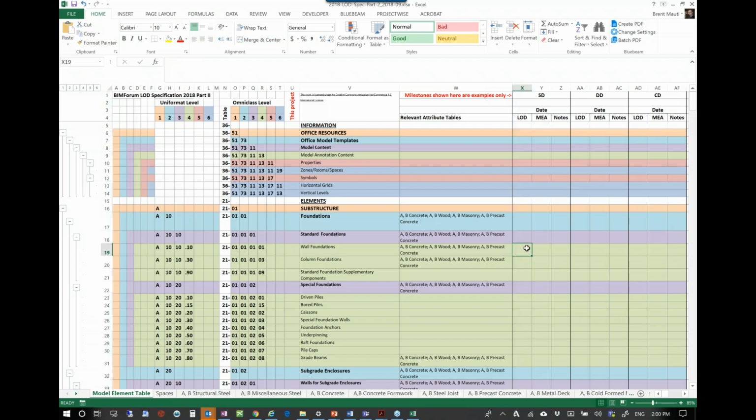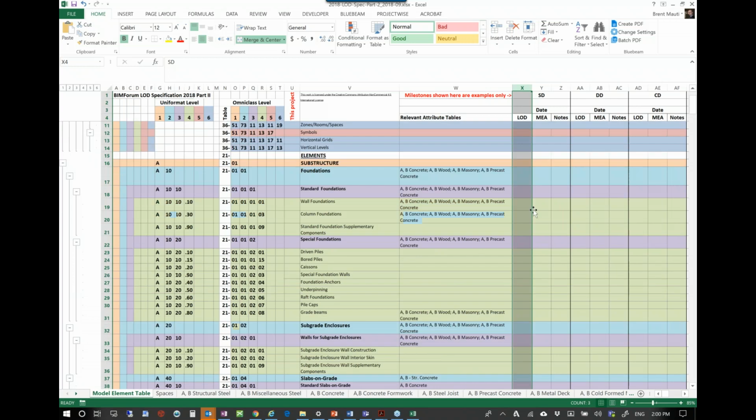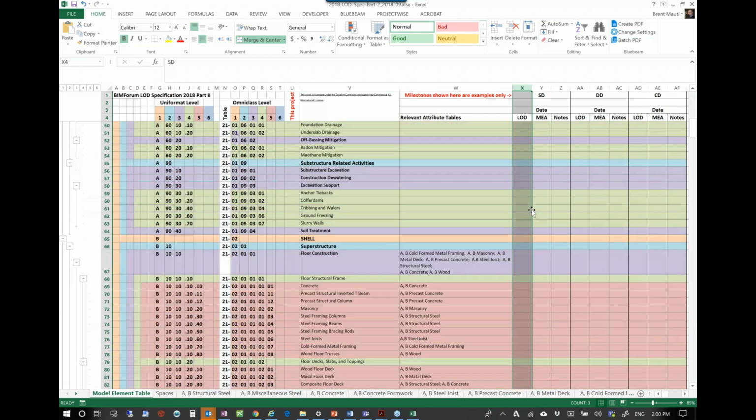This is a structural item, but maybe I'm the element owner during schematic design, because we've had this dialogue where there's fluidity: we need to quickly make the space and arrange it. So I might take responsibility in schematic just for the sake of creating the concept, but then structural would do the design and be responsible for the contract documents. Sometimes elements might flip, but for the most part it's very common what elements are usually structural versus architectural versus mechanical, electrical, etc.